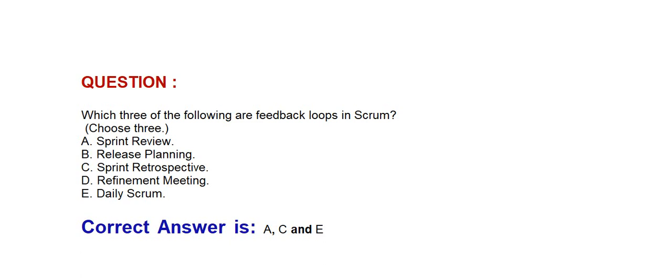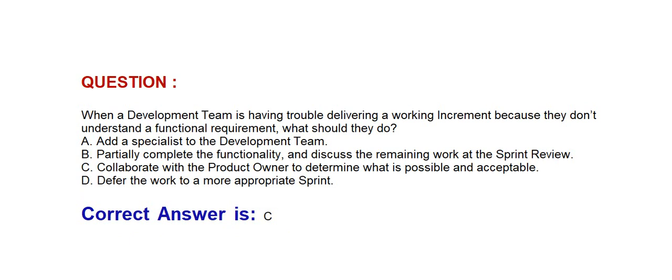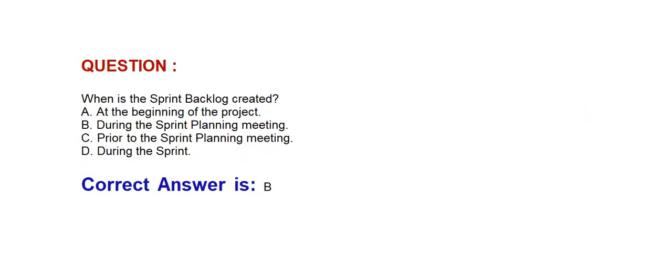Sprint Review, Sprint Retrospective, and Daily Scrum. Next question: When a development team is having trouble delivering a working increment because they don't understand a functional requirement, what should they do? Option A: Add a specialist to the development team. Option B: Partially complete the functionality and discuss the remaining work at the sprint review. Option C: Collaborate with the product owner to determine what is possible and acceptable. Option D: Defer the work to a more appropriate sprint. Correct answer is Option C: Collaborate with the product owner to determine what is possible and acceptable.